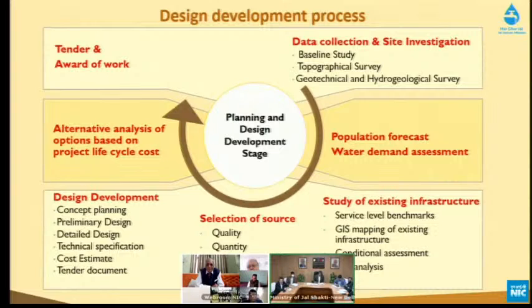Always, when we talk about design, our key focus should be on the project life cycle cost. So when we have different options in the concept stage, guidelines suggest that we should have at least 3 solutions and see which is my best solution. Not only from the capital cost point of view, because when you talk about the project life cycle, what is my capital cost, what is going to be the operational cost, and then we decide what scheme we should take.